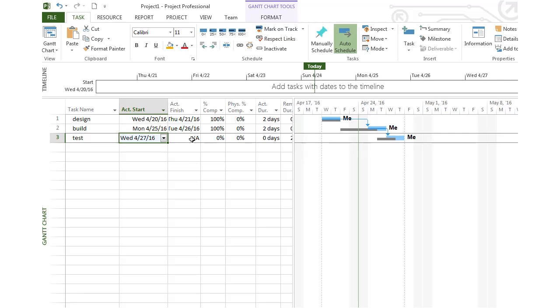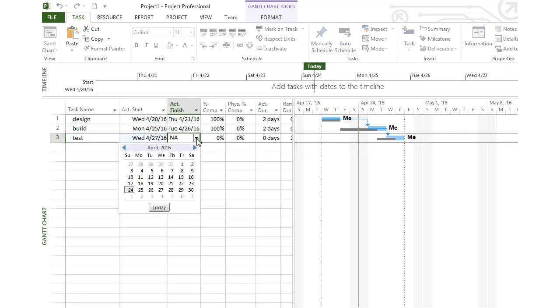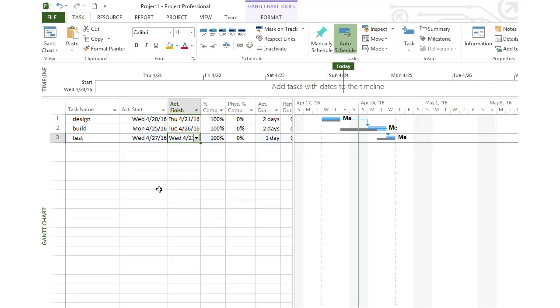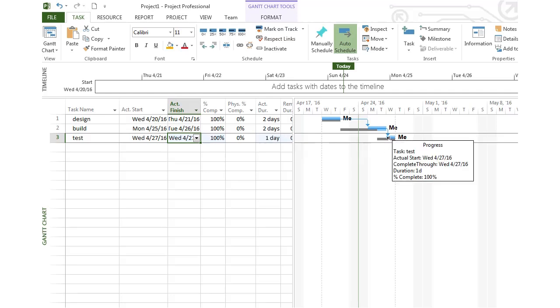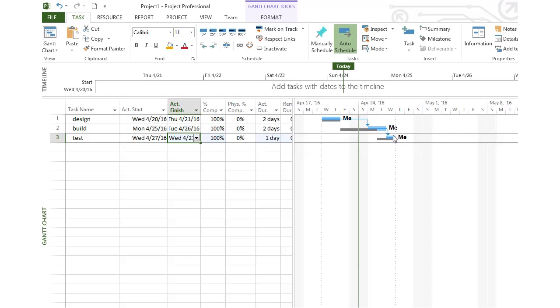We were able to finish that in one day. We started on the 27th in the morning and finished on the 27th in the evening. It only took us an actual duration of one day. Notice we've caught up a little bit and were able to finish that task quicker. Our whole project was actually finishing at the same date that we had guessed in our baseline.